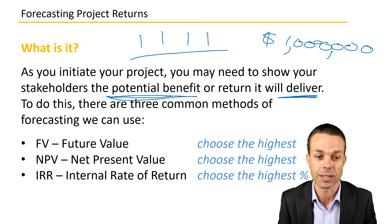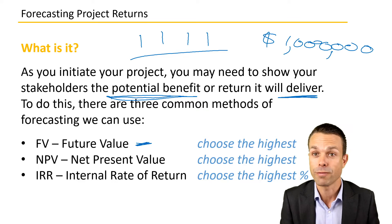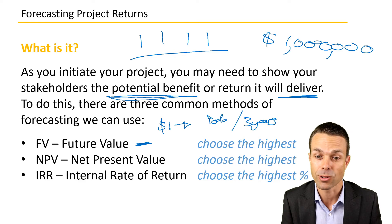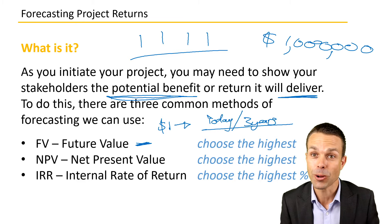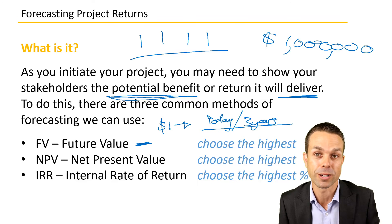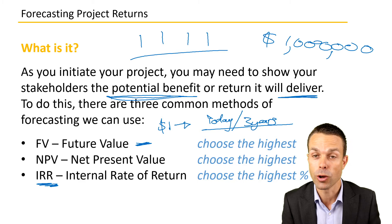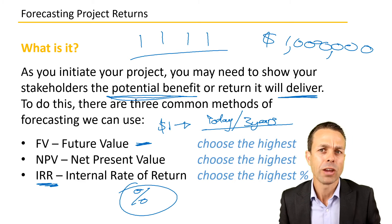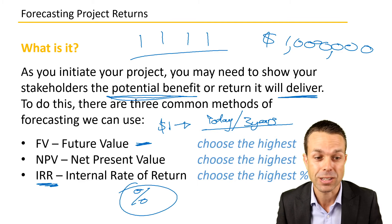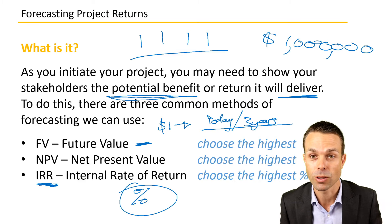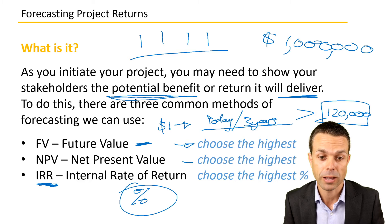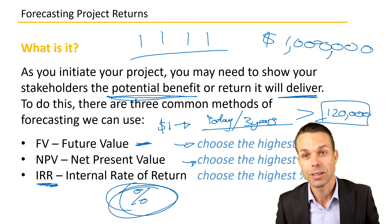The three methods are: Future Value, where we look at what a dollar today is worth in the future; Net Present Value, where we look at what a project's total outcome three years into the future is worth today; and Internal Rate of Return, shown as a percentage return in today's figures. On the PMP exam, simply choose the highest value for each — highest NPV, highest future value, and highest IRR percentage.